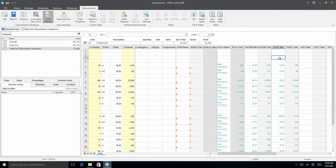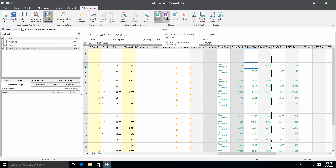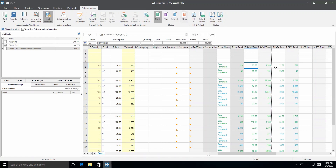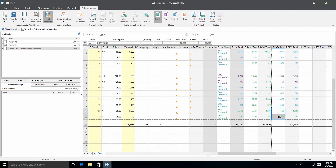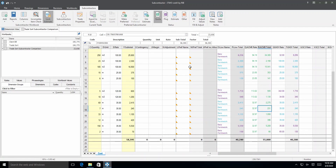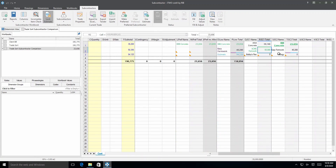Going through this video, we can see that there are various colors. i2 CostX now provides four statuses of subcontractor figures, each with an associated color: green for quote, purple for plug, blue for estimate, and orange for other. The status and color of the figures can be changed at any stage by clicking the relevant colored buttons in the ribbon. At the top level of the subcontractor comparison workbook, we can also see a bar chart with the colors below the total figure. Status and color information is also available in subcontractor custom reports.